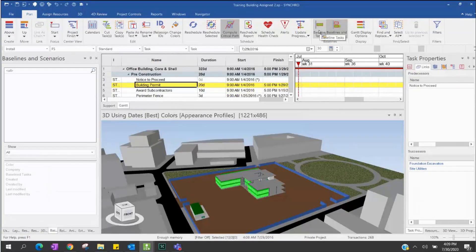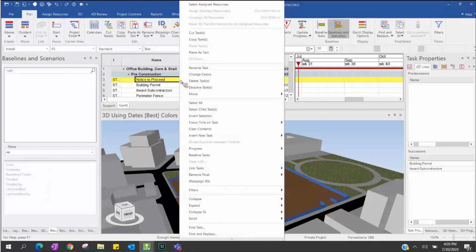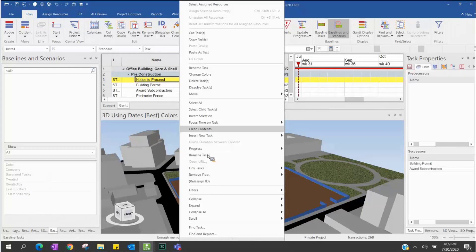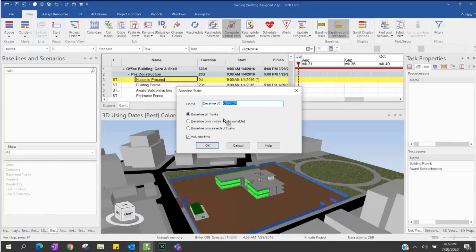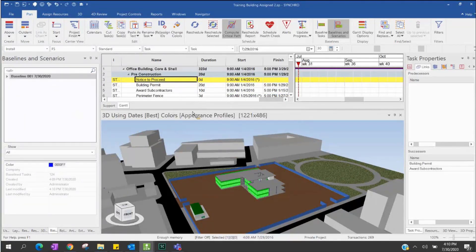Other than clicking the icon, you can also do a baseline by right-clicking on the schedule on the task — there's a baseline task option there. So there are many ways to create a baseline. I will give my baseline a name: baseline number one, and I'll keep the date so I know when I clicked the baseline. I'll put the baseline for all tasks — complete tasks. Now I have my baseline created: baseline number one.